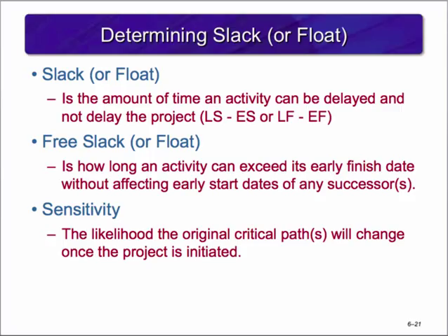When the forward and backward passes are calculated, you will be able to determine which activities can be delayed by computing slack or float. Slack tells us the amount of time an activity can be delayed and not delay the project. To determine an activity's slack, simply subtract the early start from the late start or the early finish from the late finish. Both will yield the same answer.